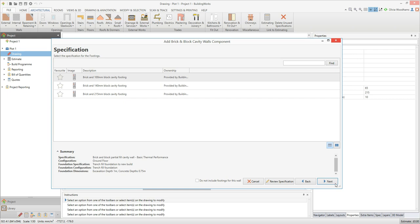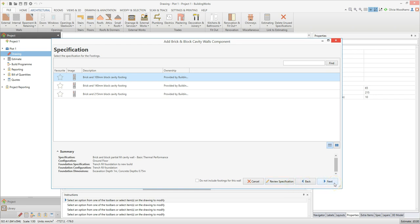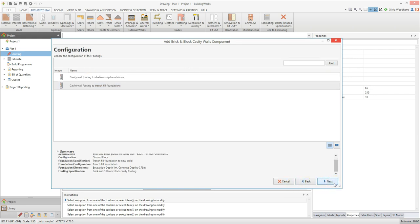The next screen prompts you to select a specification for the footings. Select the footing specification you want to use, and review it if necessary using the review specification button. Or click next to continue working your way through the wall component builder. The next screen requires you to select a footing configuration. It's crucial that you ensure your selected foundation and footing are compatible in terms of construction and dimensions.